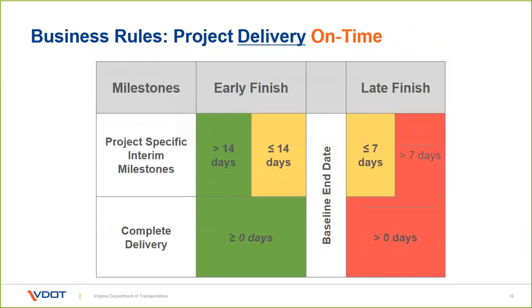We did have one main change. Today we measure a contract to the original specified completion date as it's listed in the contract. On VDOT projects, everything is a fixed date contract. For the larger projects that have milestones in the contracts, we want to have milestones on those as well, just to mirror what we're doing on the development side.